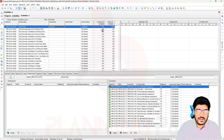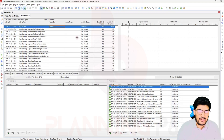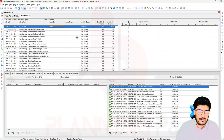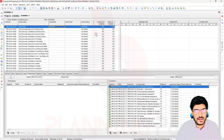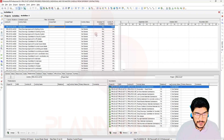We take the data from Primavera, export it or paste it into Excel, and the dashboard updates automatically. In upcoming tutorials I will upload two or three dashboards with their formats — how we can take data from Primavera and update an Excel dashboard in five minutes, with only five to ten percent manual work. The highly recommended method is to always update progress within Primavera P6. Don't import progress from Excel because there can be too many errors — resource assignment issues, resources being deleted, and other errors that are very difficult to locate and fix.